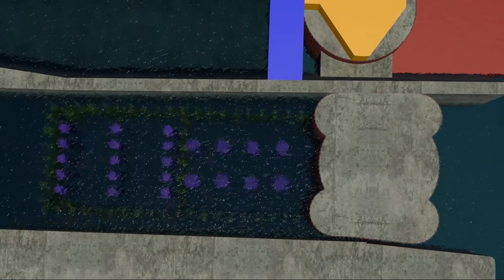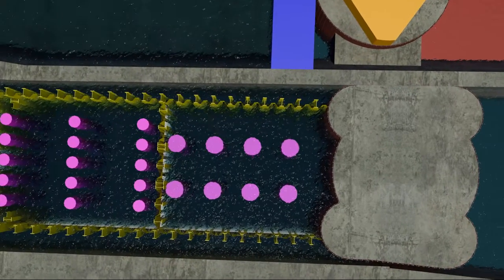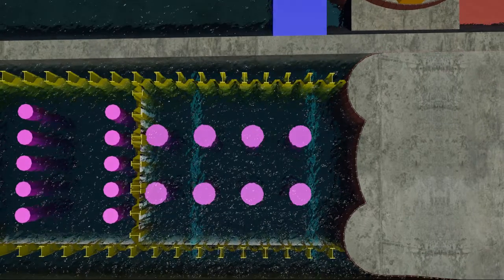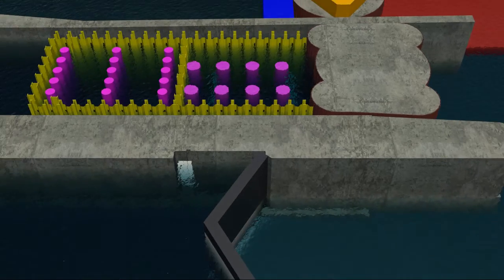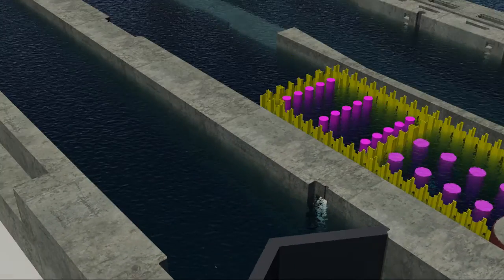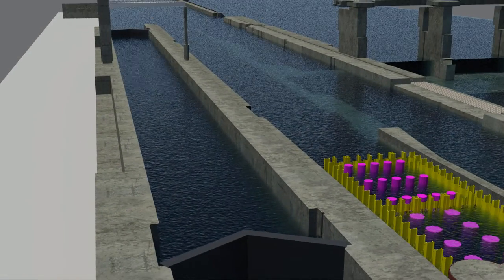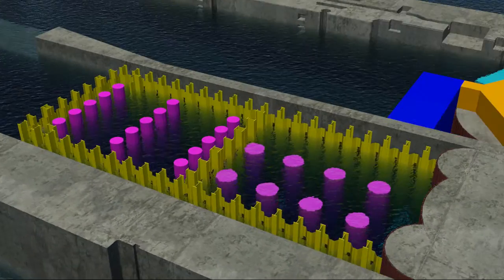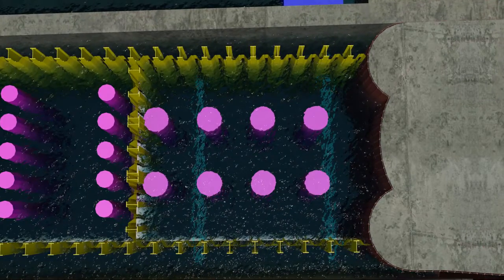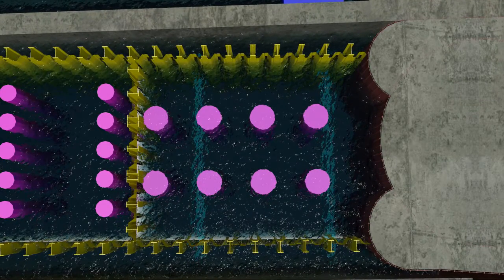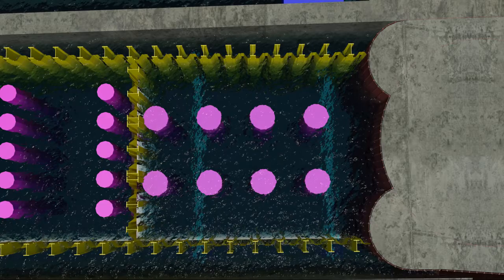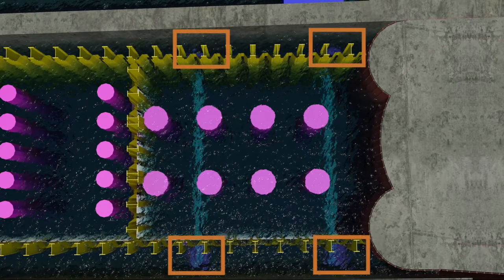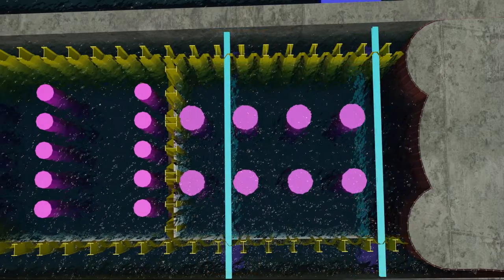We then proceed to install a coffer box upstream of the closure cell with its respective drilled shafts and the lower stabilization struts. The next part of the construction sequence will require the land chamber to be at low pull. At low pull, we place tremmy concrete bearing pads for the lower struts and install the upper struts. Once the stabilization struts are in place, the land chamber can return to operation.